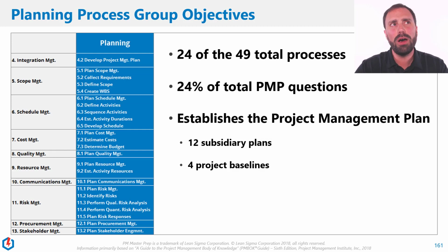And then we think about, well, we have these things defined. We know what we're doing here, how much it's going to cost, what the schedule is, what the scope is. And then we say, how are we going to evaluate as we go forth? Because there's a 4th project baseline that I talked about, right? And that's the performance measurement baseline. We're going to go through these more in depth, but I want to introduce you to the topics. So the performance measurement baseline integrates all 3 of those, the scope, schedule, and cost baselines. And it does so in a way that we can evaluate the baseline as we go through.